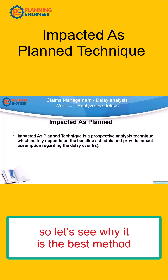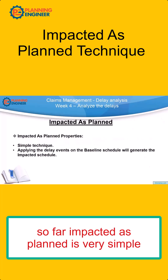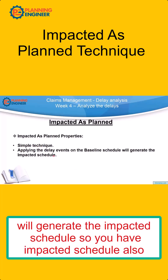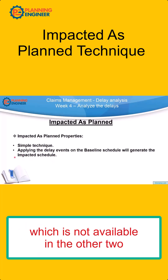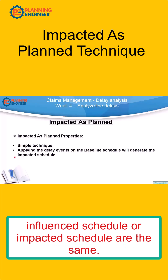Impacted as Planned is a very simple technique. You apply the delay events on the baseline schedule and this will generate the impacted schedule — which is not available in the other two methods. The impacted schedule and the influenced schedule refer to the same thing.